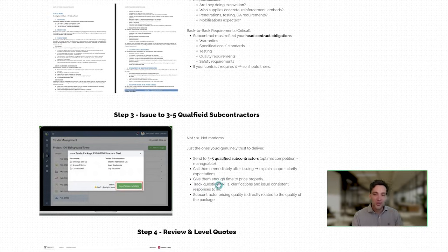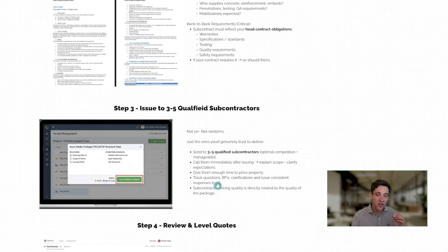So unfortunately, construction is a competitive environment. Your clients will get 3 quotes to check your price against, so you should also have numerous qualified subcontractors that you trust, that you're happy to work with. You should be getting 3 to 5 quotes for every single package. Now, the goal here isn't just to send it out to any 3 to 5 random subcontractors. It's 3 to 5 subcontractors that you would be very happy if they were able to do the work.